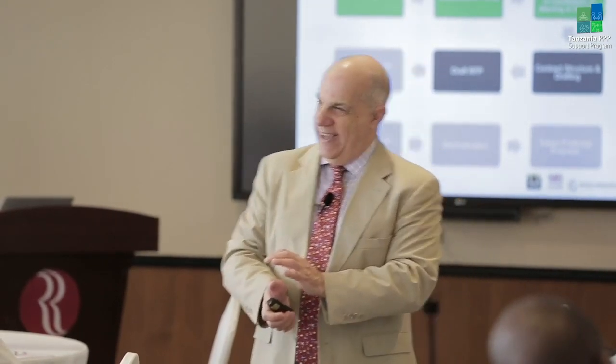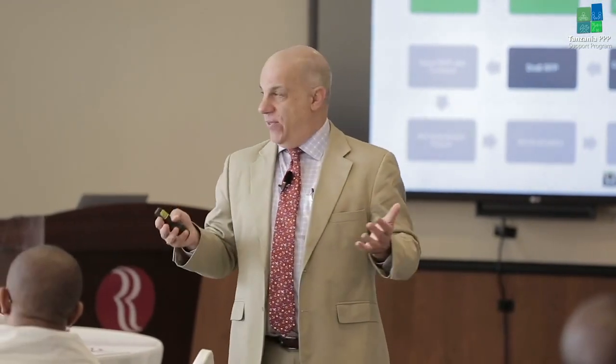Yes and no. The yes part is we need both of those. The no part of it is we typically ask for those in separate envelopes to be delivered separately. Why would that be? Why do we want that separately? Because at the initial stage, we only evaluate the technical proposal. Thereafter, after we get the winners from the technical proposal, you can open the financial proposal. Right. So we want to make sure technically their proposal is compliant, meets our output specifications. If it doesn't, we don't really need to worry too much about their financial proposal. So we want to make sure it's compliant.